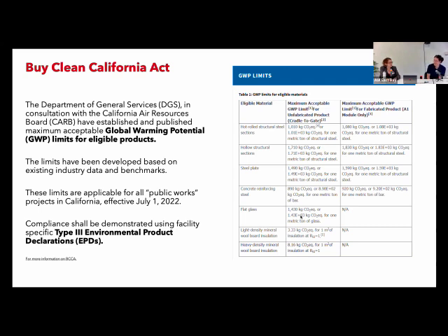I want to say something like health or something. Yeah, there's a couple of folks that are exempt. But certainly if there's any state funding whatsoever, start by assuming that there are limits. And then again, after interacting with their AHJ, they might say, actually, we're not part of that for reasons X, Y, Z, but any exemption should get documented in writing.